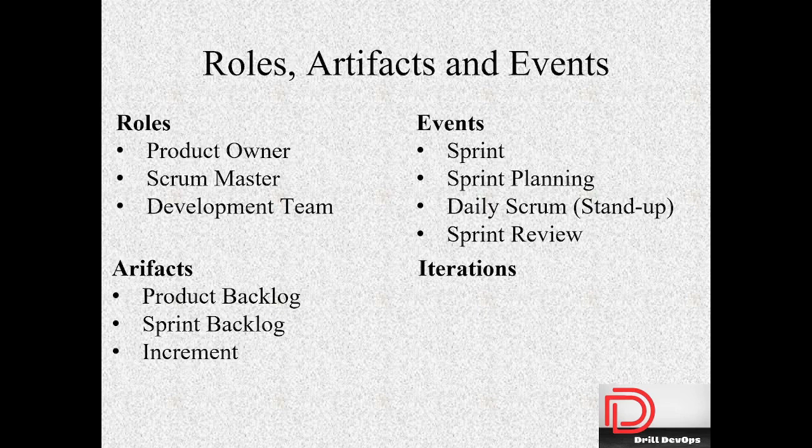The sprint backlog is a subset of the product backlog, where it contains a set of work items like user stories, tasks, subtasks or bugs selected by the development team to be completed during the current sprint time, which is like 2 weeks. So over these 2 weeks, the development team selects what they are going to work on. It represents the team's commitment for that specific sprint, and as the team works on the selected items, the sprint backlog may evolve or change based on the feedback and the team's availability or bandwidth.